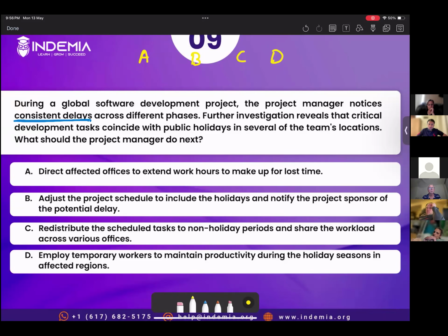In the question, there is no indication that you have to stay within the critical path. If the question says that there is no room for extension, then definitely C is the right option. Then you wouldn't be going with option B. But the question doesn't talk about critical path or project duration or any such constraints. When there is no such constraint mentioned in the statement, we will be going with resource leveling. And that's what's happening here.